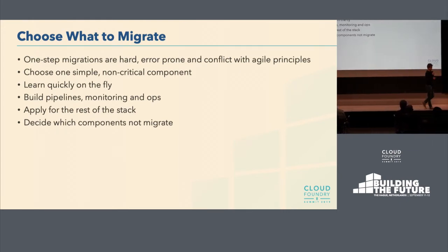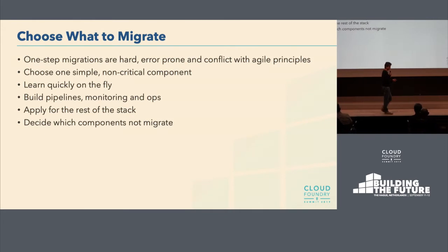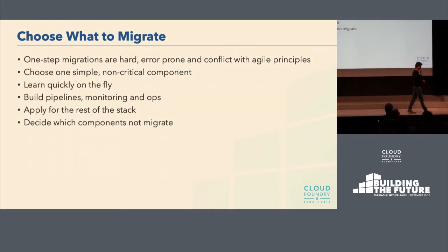You should really look into your application stack, look into each application and see which components it is built from, and choose the one component which is less critical and a component that you really can migrate first. And we propose to first migrate that component, learn everything you need to learn on the fly, so do not waste months and months learning Cloud Foundry and all the surrounding technologies. You just take one component and you learn on the fly how to use Cloud Foundry and how to